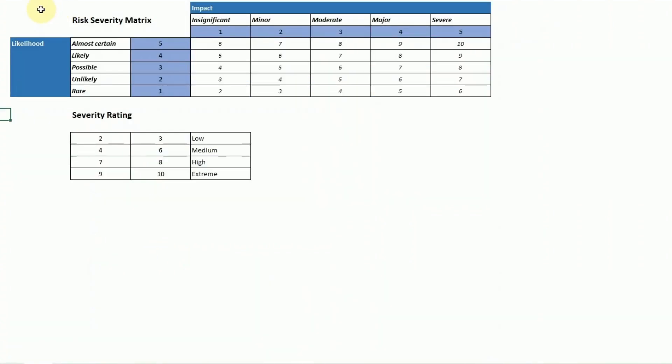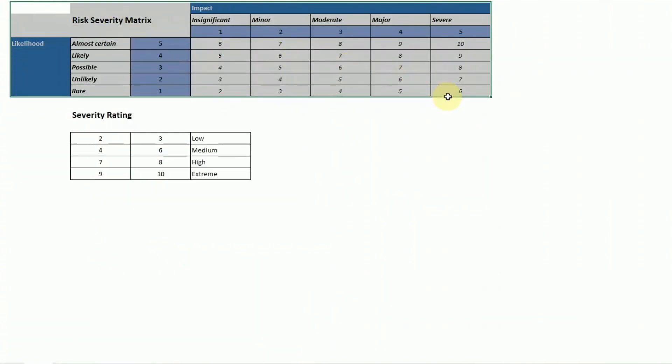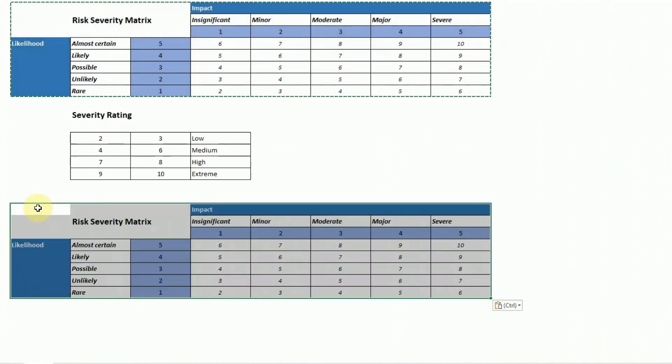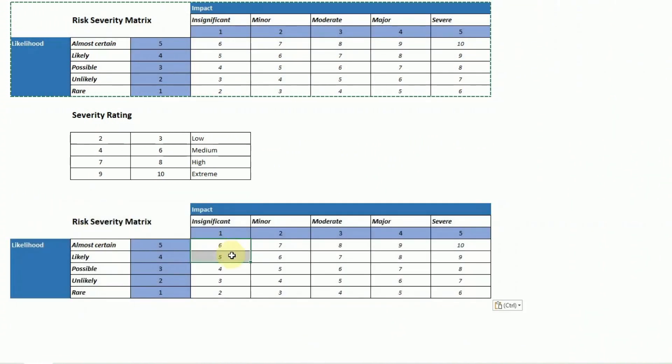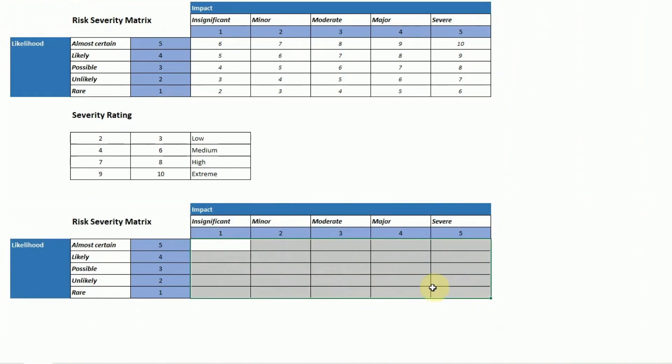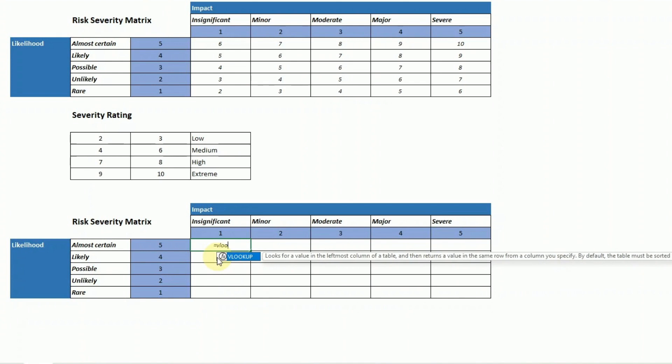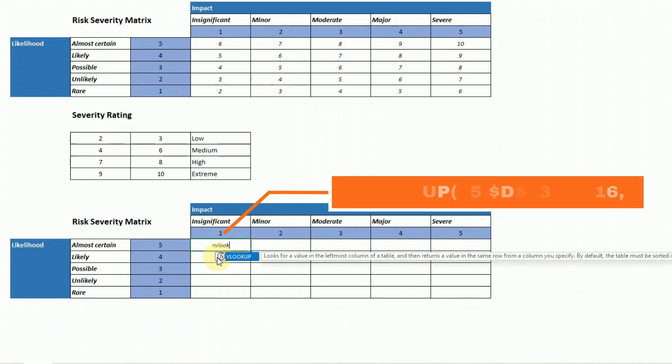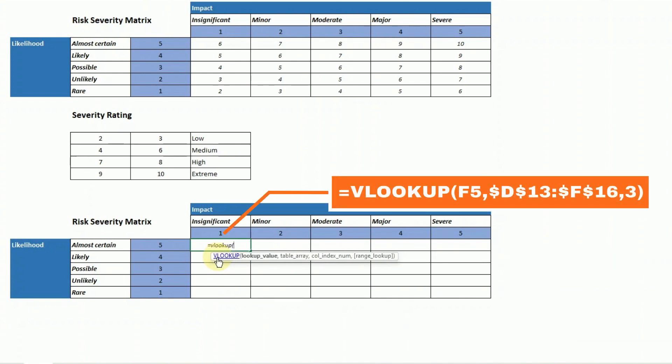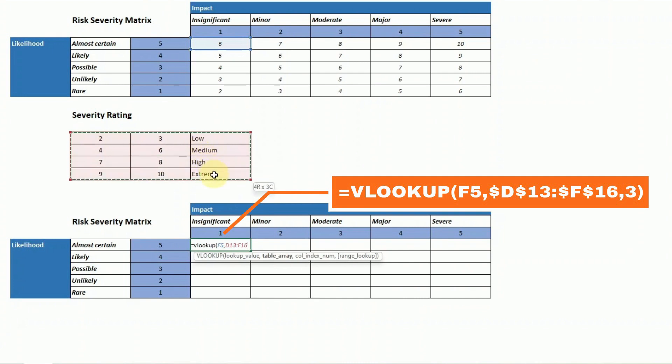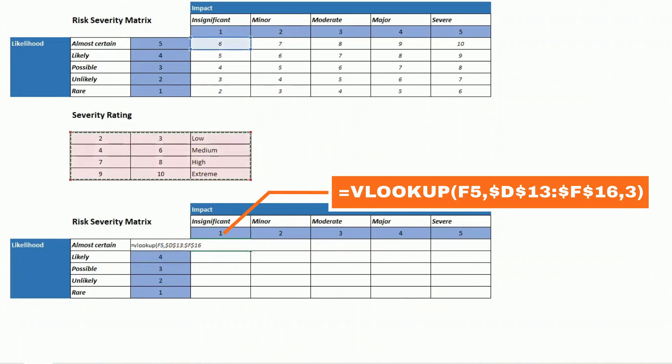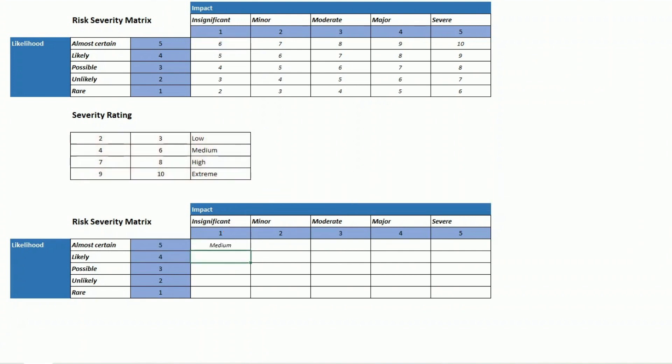When this is done I copy and paste the risk severity matrix because what I want to do is I want to put a description of the risk rating instead of having a number here. So in order to do that I create a VLOOKUP. This is the old lookup but just in case you have an old version of Excel. I am looking for the value in the risk severity matrix. I am looking for that value in a table that I have created here and I bring back the description of the severity: low, medium or high.